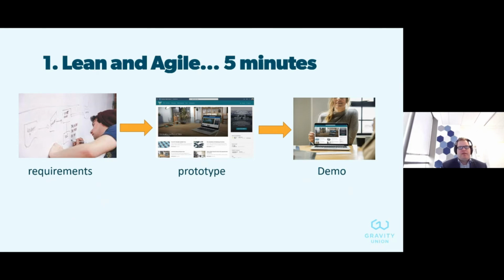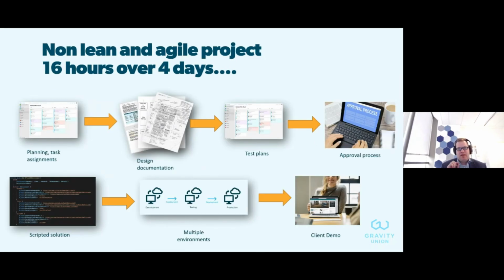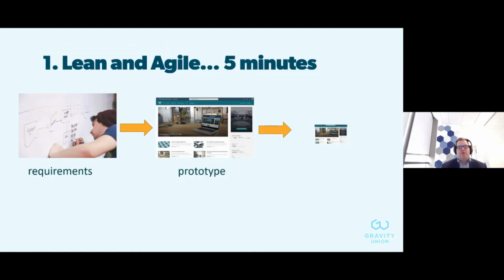And so this old software process, this custom development software process, is something we're applying to a platform that really no longer needs software development in many cases. Now, there may be dimensions of the project, like custom integration, large scale migrations, or really complex workflows, where we might benefit as a project team from adding more rigor and process. But if we're spending an additional 15 hours and 55 minutes on a process that we could have done in 5 minutes, where's the value?